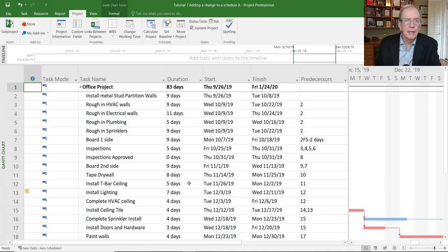If we're contemplating it, as opposed to updating, which has the connotation that it's already been completed, so it's history and we're just updating that process and looking at the impact it's having, we're inserting what our plan is for it and seeing how it impacts the schedule. And then we may cost out according to the type of impact. For example, if this change order is impacting the schedule by 5 days, let's say, then it's like, well, how could we get that 5 days back or shorten the impact of this by 5 days?